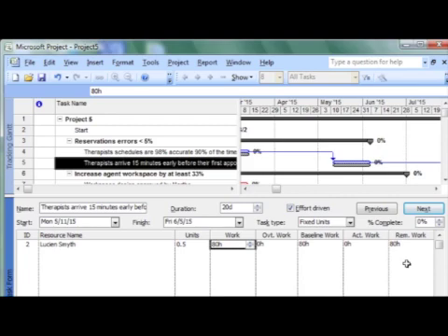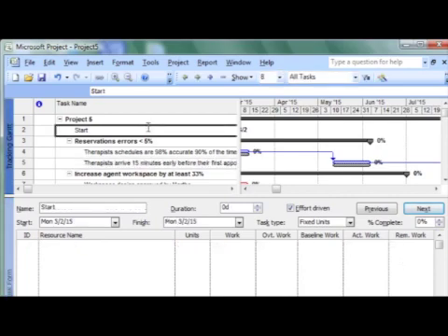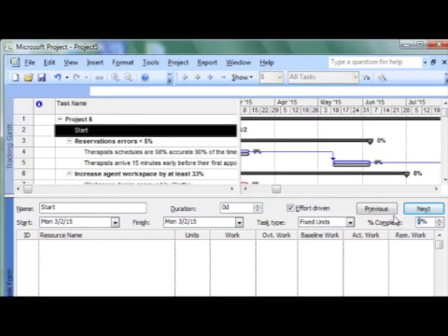As I mentioned, the information we need from team members for every in-progress task is the actual hours worked on the task this past week and their estimate of the hours that will be required to finish the task. So as I mentioned, we've completed the first week of the project and we have 5 tasks that should have started. 4 of those tasks are on project number 5 and 1 is on project number 4. Let's start by updating project 5. So the first task we're going to update is task number 2, which is Start, and we're going to enter 100% complete in the lower half of the window because the project has obviously started.